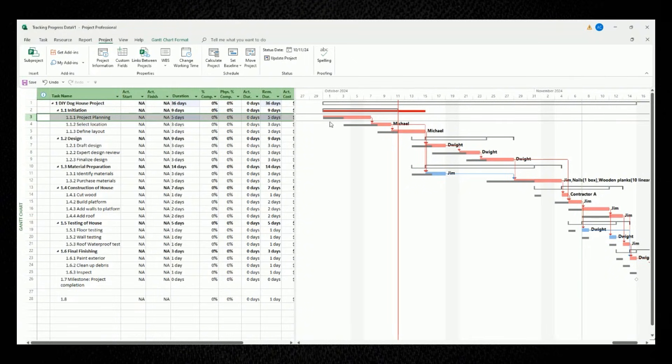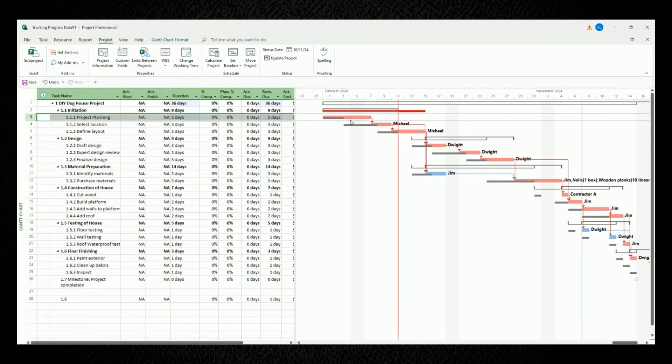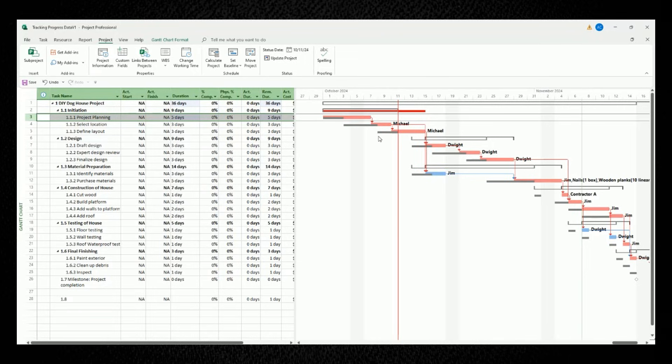And immediately, once you notice in the Gantt chart to the right, the planned baseline for this task has stayed the same. But the updated duration that's highlighted in red, guess what? It increased in length. In other words, the schedule has been delayed. So right away, we can see a variation in our schedule from what was planned to what we expect to actually complete.